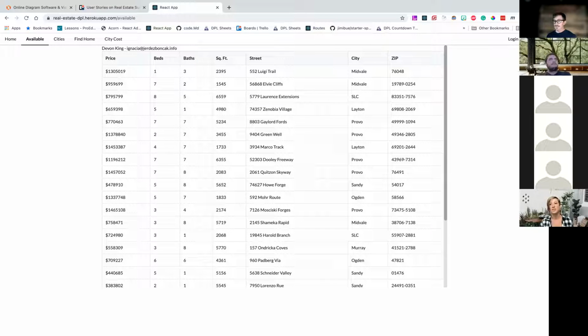There's really not a right or wrong answer. It's just something you have to be prepared to answer. And as you're starting to get a little more experience, even on your personal projects or on your homework, when we give you the requirements, spend a couple minutes to ask yourself that question. How long do I think this is going to take to build? Write it down and then see how close you were.